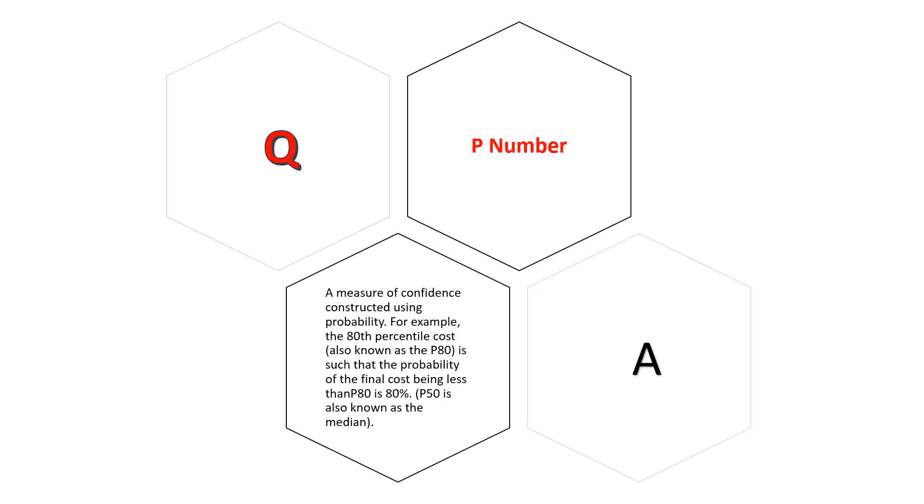P number: A measure of confidence constructed using probability. For example, the 80th percentile cost is such that the probability of the final cost being less than P80 is 80%.